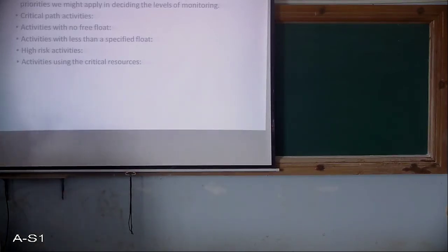Any delay in such an activity on the critical path will cause a delay in the completion date of a project. That you cannot touch. You cannot do any modifications for such kinds of activities.